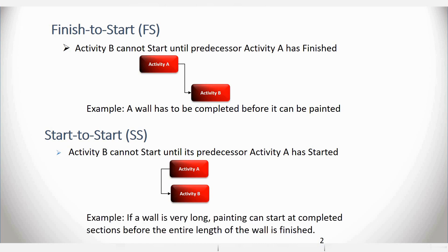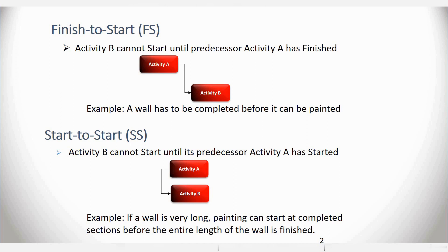Another example is, if a wall is very long, painting can start at completed sections before the entire length of the wall is finished. So you could literally start the activities together with a slight lag to Activity B. And what I mean by lag is delaying Activity B by a few days before it starts. And we'll be looking at logical relationships with lags very shortly.